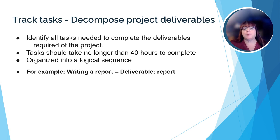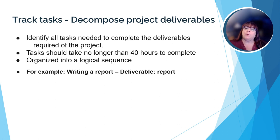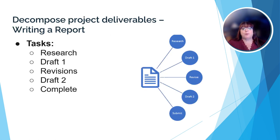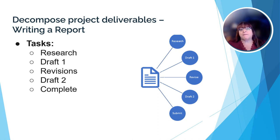The WBS will help track tasks by decomposing the project deliverables. The project manager will identify all the tasks that need to be completed within a 40-hour time period and organize them into a logical sequence. For example, how would we decompose the deliverable of writing a report? First, we break the project down into manageable tasks: research, first draft, revisions, second draft, then the final product ready to be submitted.